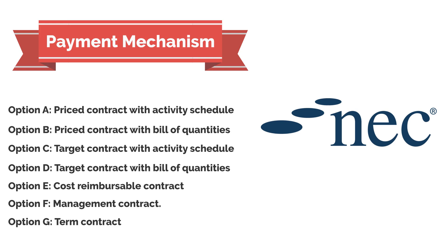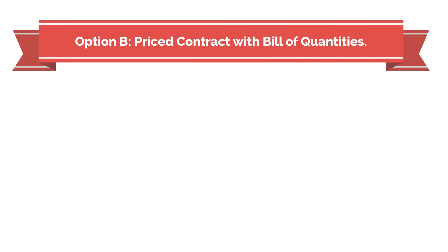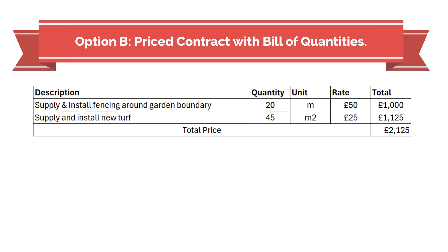In this video we're going to delve deeper into Option B, price contract with bill of quantities. As the name suggests, under this option the contract includes a priced bill of quantities. Each item on the bill has a corresponding rate which forms part of the overall price.